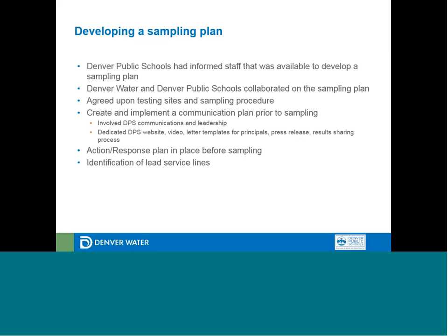We also worked pretty closely with our communications group internally at Denver Public Schools and the leadership within DPS. Denver Water was also involved with creating a video, and we created a DPS dedicated website for this effort that had the letters in multiple languages, and we had a press release and a results sharing process in place before we even began.